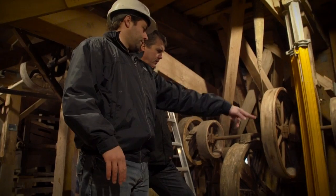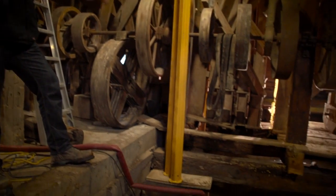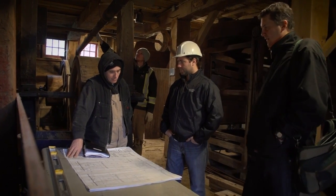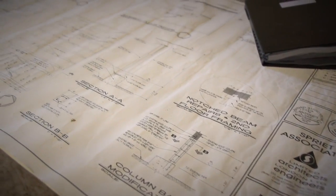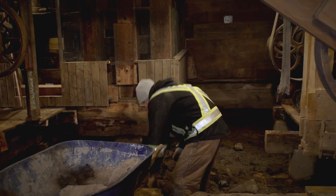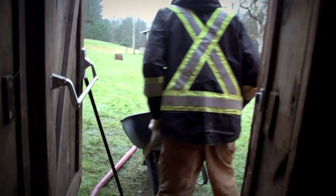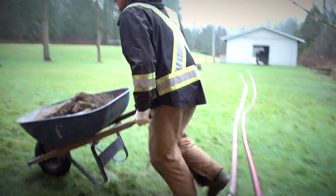So with the consultants and our experience, we've come across a solution in order to repair that with the same guidelines of what the drawings were, but just using different construction methods. The challenge of trying to get that water out of there and then to excavate and put the geotechnical in the stone, that's how we thought we were going to do it, was a challenge in itself, because I'd have 5 guys with wheelbarrows taking like 10 dump truck loads of stone in through a man door. Like, I mean, just so labor intensive in order to make that happen.